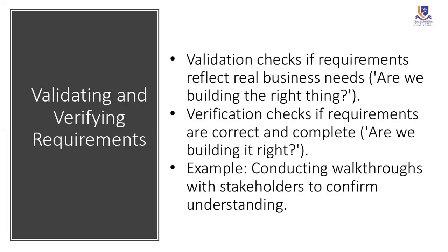As a BA, you verify that the requirements are correct and complete, and then you go ahead to validate. Are we good? This has to do with you conducting walkthrough sessions with the stakeholders to confirm that the understanding is very clear,